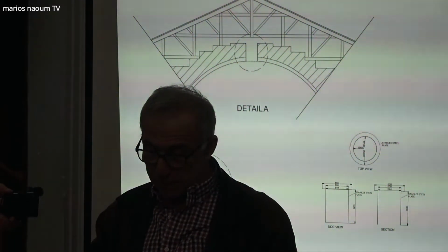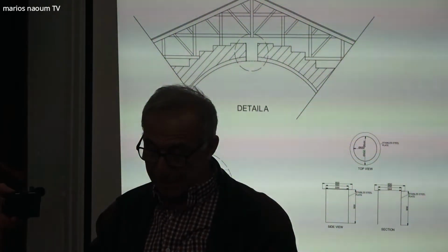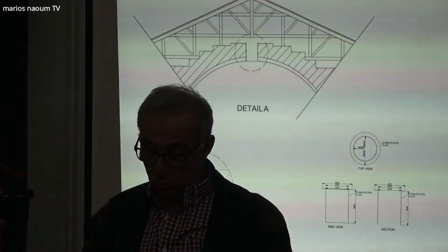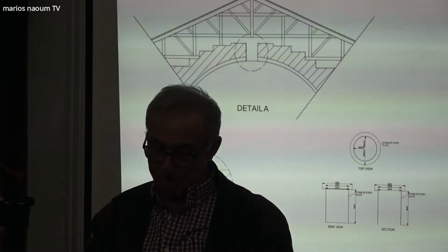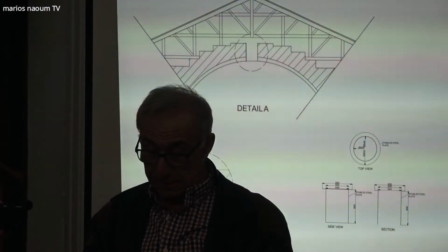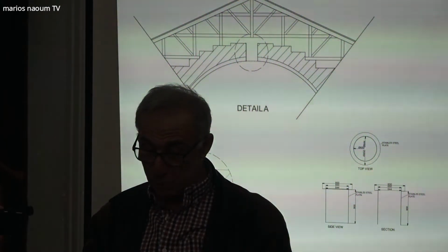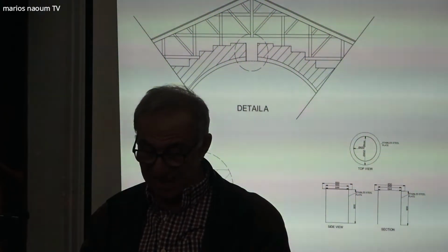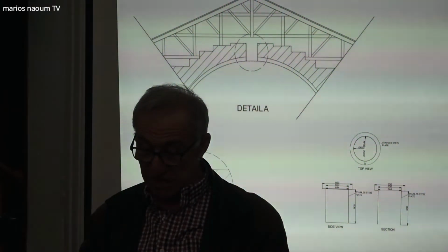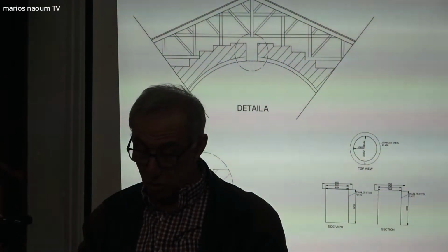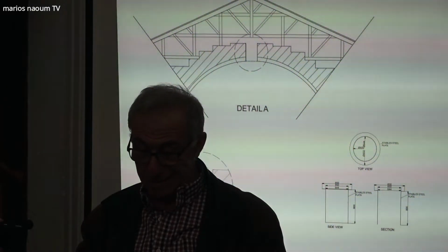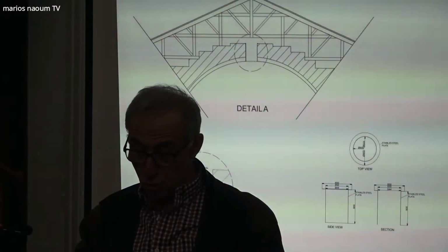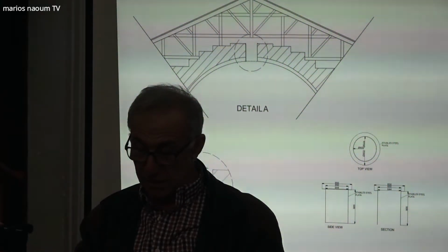The church was designed from the beginning to be generally plastered and painted inside. I do not understand how they used tetrapelekiti internally for the arches, columns, and cornices, and then painted on top. Ideally, the tetrapelekiti should be exposed internally by removing the paint, but this is tedious, lengthy, and specialized work, and will take a long time to do at great cost. So it is best not to undertake this work if the funds are limited.